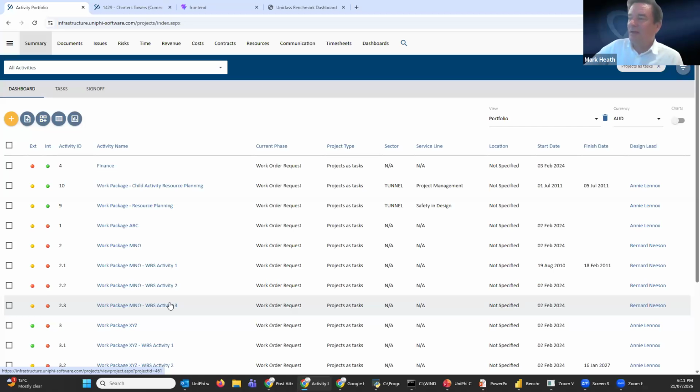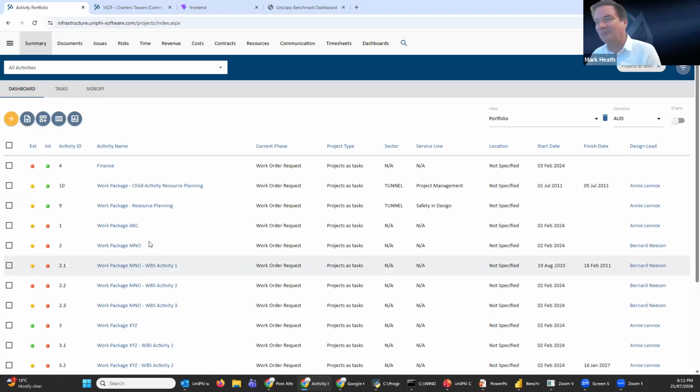But during design is the main element of the controls for this particular instance. And what you're doing through that is tracking: has it been issued for interdisciplinary review? Is it with the project engineer? Is it ready for construction, etc.? And at each point of that release, it gets an earned value percent complete.